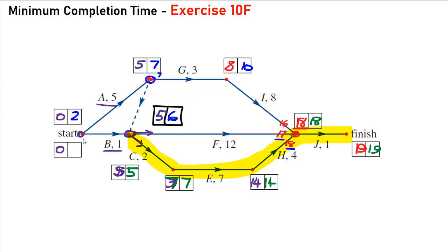Now, we might get back to junction C again, and we can see that the latest start time there is 5. And if we then proceed along this path for job B, we're going to see that if we go 5 take away 1, we would get the answer of 4. But hold on a second, we've got 2 jobs now from the start, B and A, that have a later start time. Now one of them has to be equal to 0. One of these jobs we have to start at the beginning.